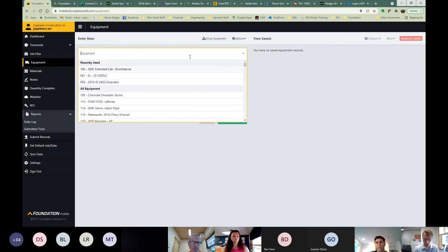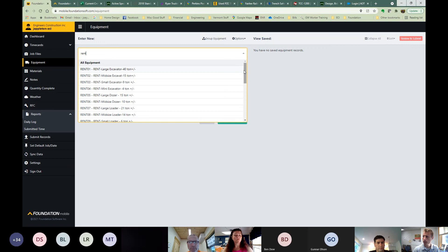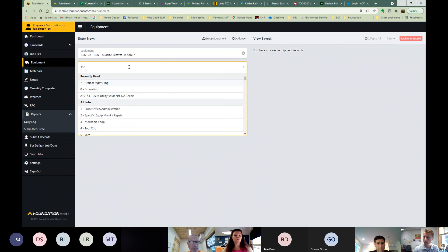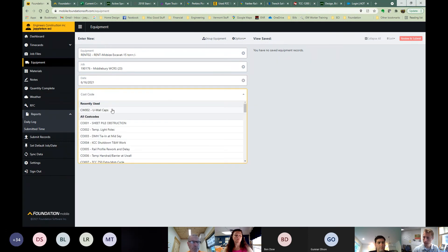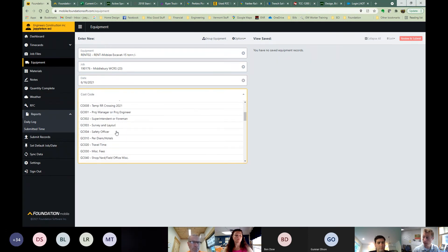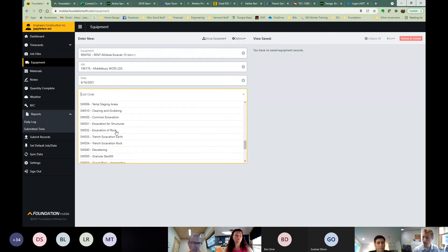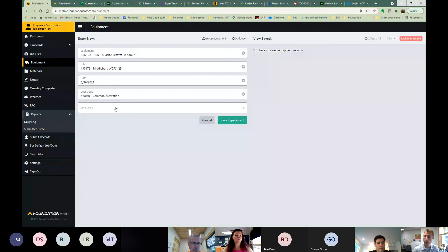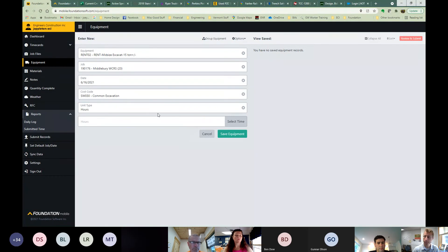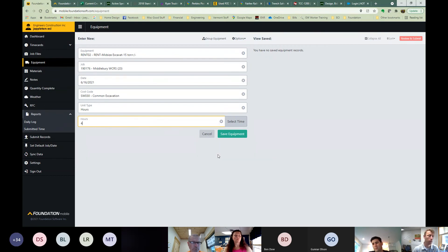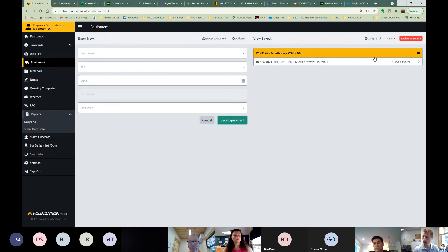At the end of the day or the next morning, whenever you do your submissions for your equipment, just make sure if you've got a piece of rental equipment on your job that you log it. So if I choose a mid-size excavator and I'll choose a job, and I'll put my date like I normally would, my cost code, whatever the equipment is working on, common excavation, I'll choose in this case, SW. And then unit type is always hours, right? And then to type in the same hours that you ran that piece of equipment that you would for our own ECI equipment. And so that's it. Save equipment. Basically enter it the same exact way you would do our equipment, except it's just a general rental category.